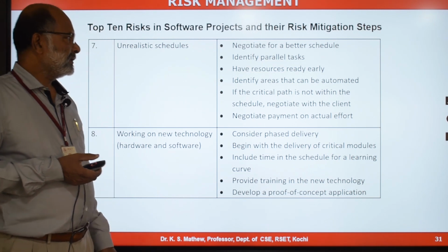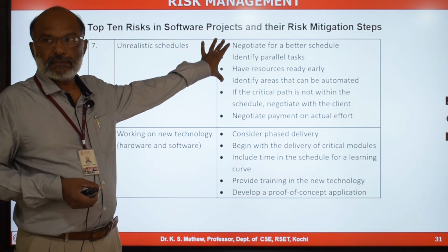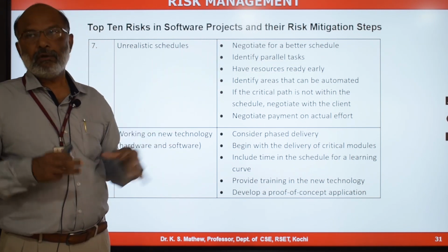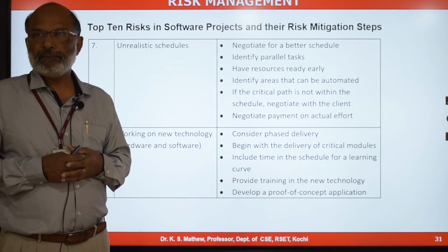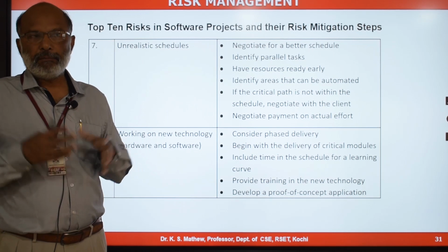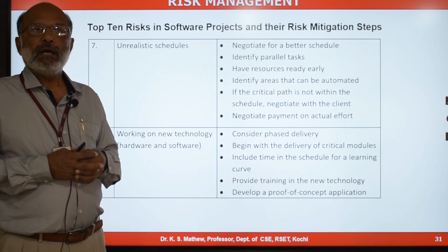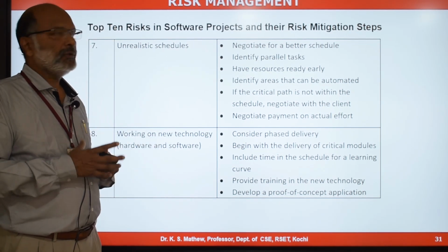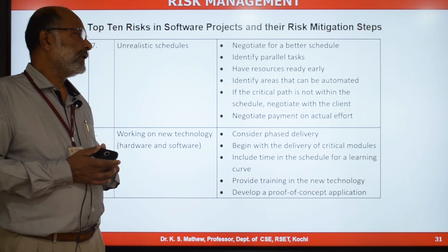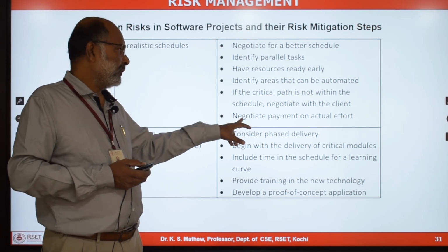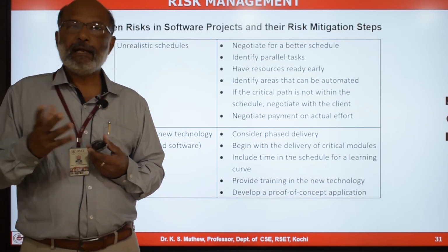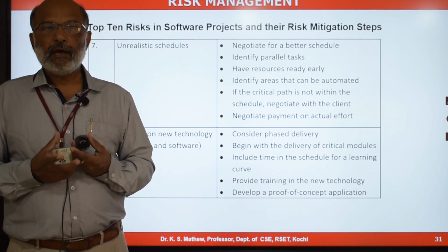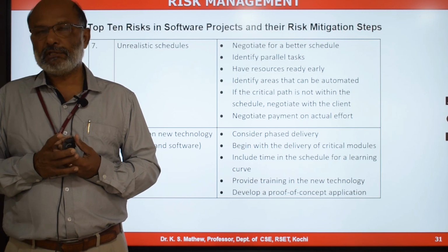Even after doing all these activities, if the critical path is still not within the agreed schedule with the customer, negotiate with the client and say we will not be able to complete the project within the schedule because it is a forced schedule, and you need to get additional time for completing the project. Negotiate payment on actual effort. That is also another mechanism we can adopt to avoid the forcing of schedule on the project team.